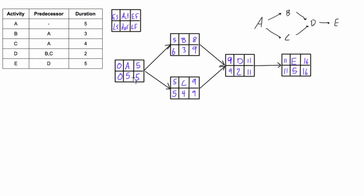Now what we want to do is we will draw the CPM network diagram for this exact same project. So first of all, the first activity will be activity A as it has no predecessors. So we'll draw it just like this where we have the activity over the arrow instead of the activity being on the node like in the PDM network diagram. And activity goes from one node to another. So next up we have activities B and C both depending on A, so we can draw those coming out of this node where A ends.